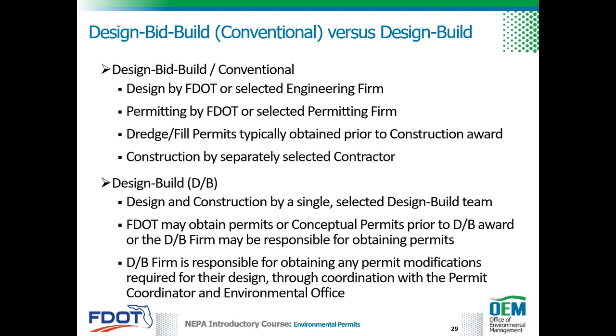The design-build process is when the design and construction are done by a single selected design-build team. FDOT may obtain permits or conceptual permits prior to design-build award, or the design-build firm may be responsible for obtaining the permits. The design-build firm is also responsible for obtaining any permit modifications required for their design through coordination with the FDOT Permit Coordinator and the Environmental Office.